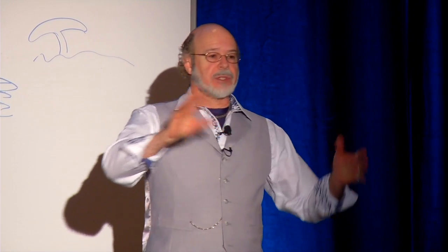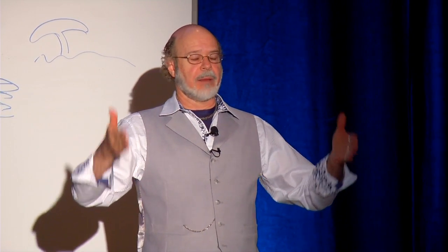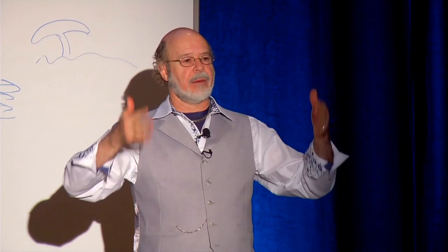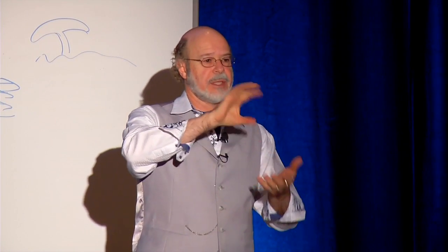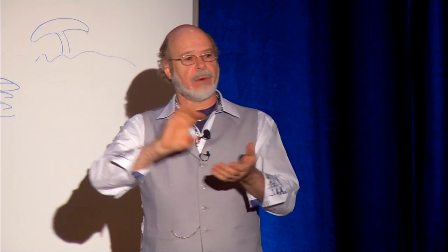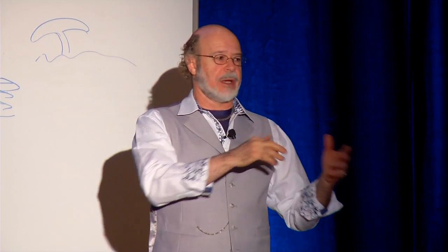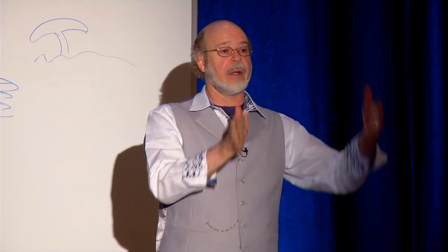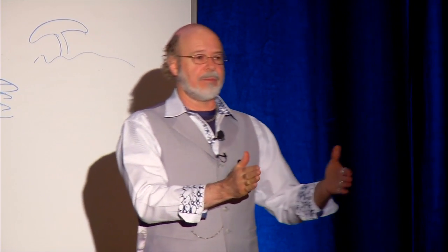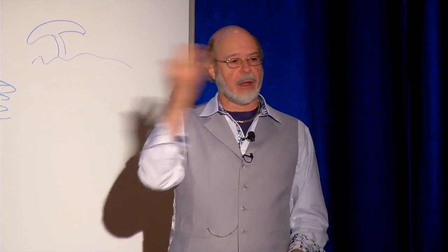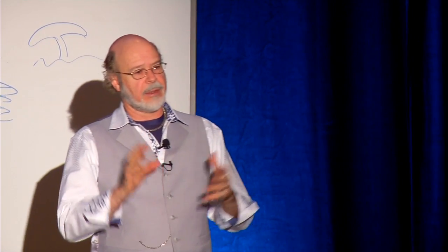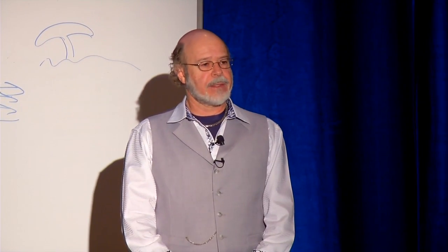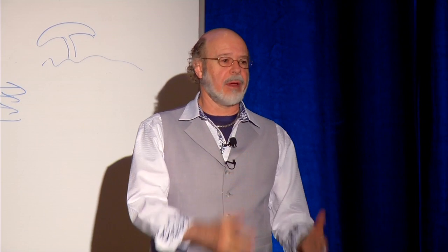Every one of my projects they can look at, they can bring up any given project, or they can look at my time, CA phase, all projects combined, what's the average time for all jobs, what's the average time for a particular owner, because we have some owners that have certain peculiarities. They can look at typical project architect's time and break that down, but the project managers put together the scheduling tool for that. So it's based upon our time card input.